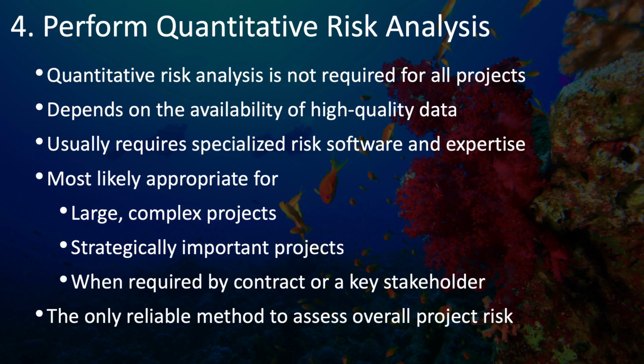Normally, quantitative risk analysis is only going to be done for the most complex and largest of projects that are very strategically important or that are otherwise required as part of your contract, or if you have a key stakeholder that requires that you do quantitative risk analysis.